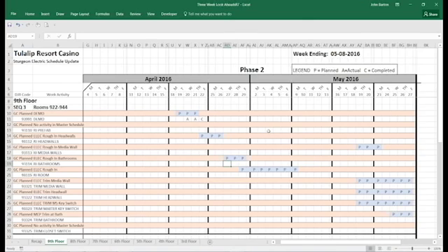And that way nobody's having to move off the job and they're still working on the same exact stuff as they were anyway. And they're essentially going to be the guys in the prefab shop that are going to install it in the future. So it's not like you got one crew that just does that and another crew that does this. Could be that you're pulling the rough-end guys and throwing them in the prefab shop 2 or 3 days here and there to just get ready for the next bump of labor that you need to get through.